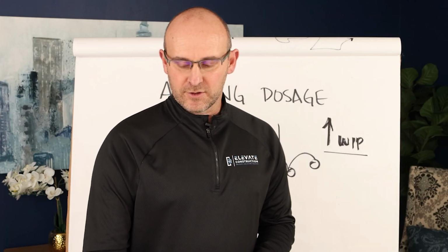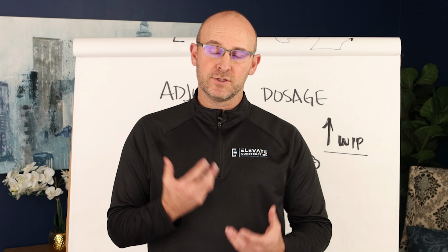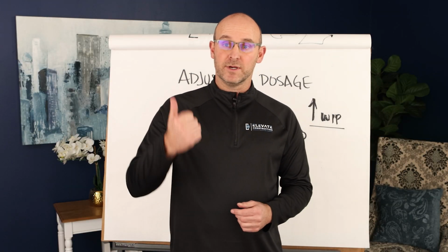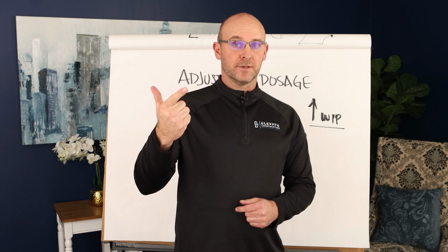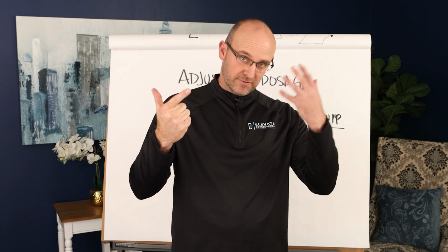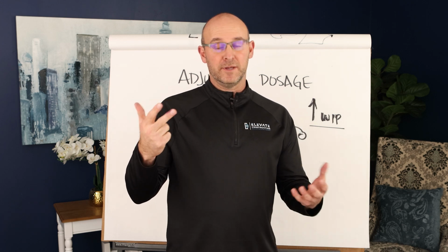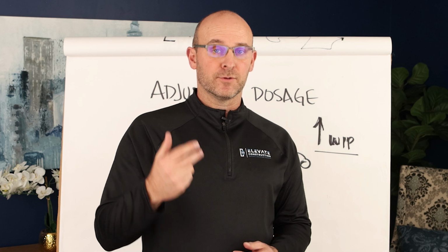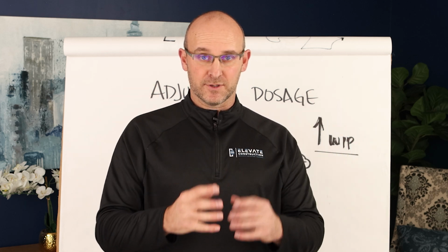When you increase work in progress above the capacity of resources, then you enter into a downward productivity spiral for a number of different reasons. But bringing out too many materials brings the 8 waste. Rushing and pushing and panicking really starts to confuse the human mind. Adding additional people above needed levels enters you into a downward productivity spiral because you have too many people with less production, right?